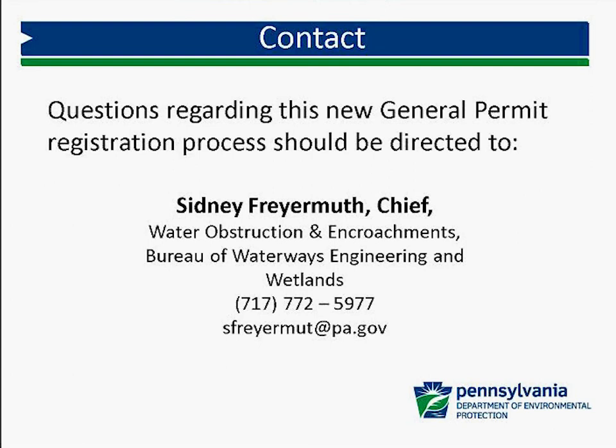In the disposition status below that, there are 4 blocks: acknowledged, withdrawn, incomplete, extension request. If you fail to submit the fee with your permit, we will do the review, but you will get the incomplete box checked with a date and the comment, must submit fee before we proceed.